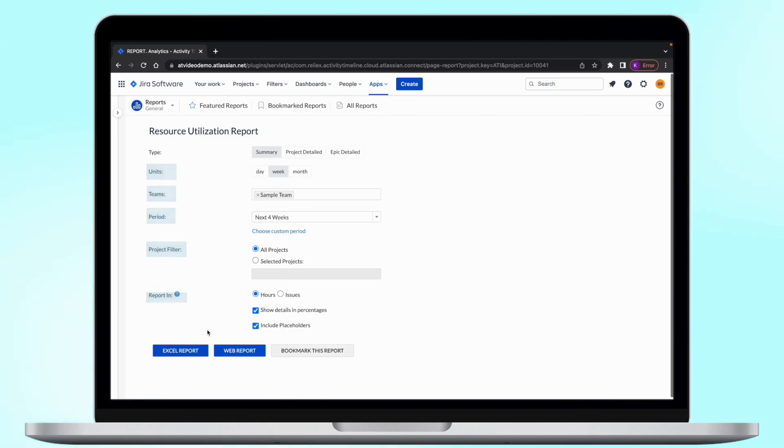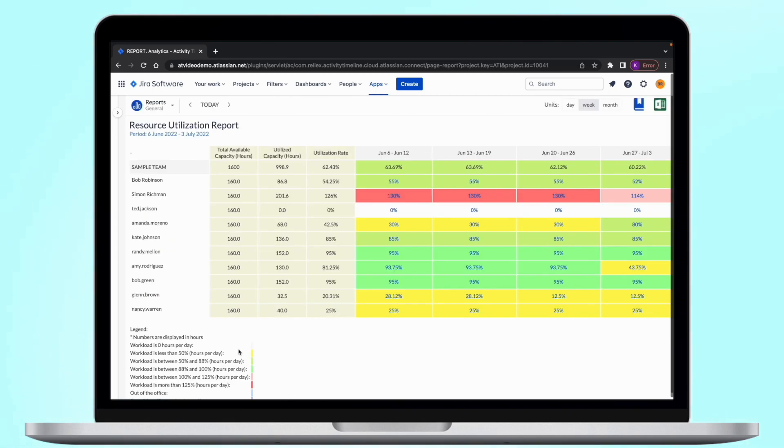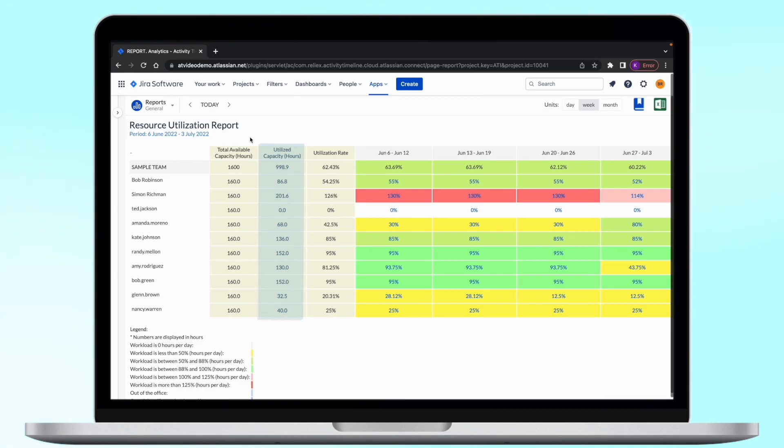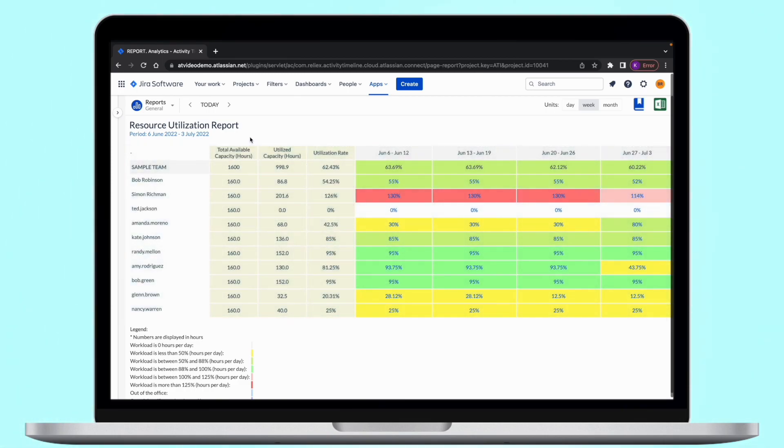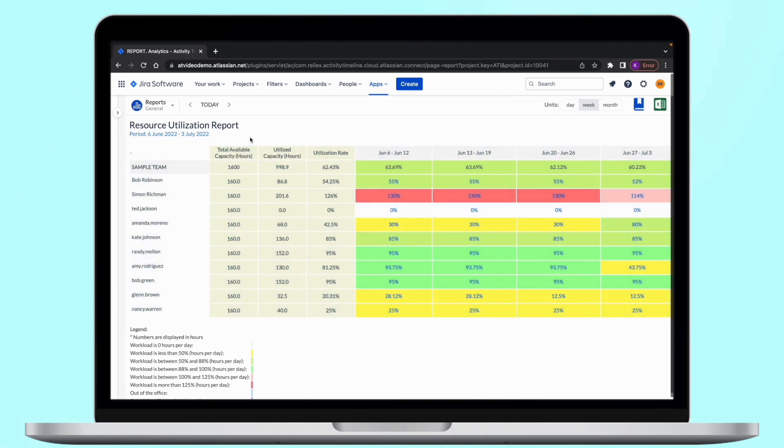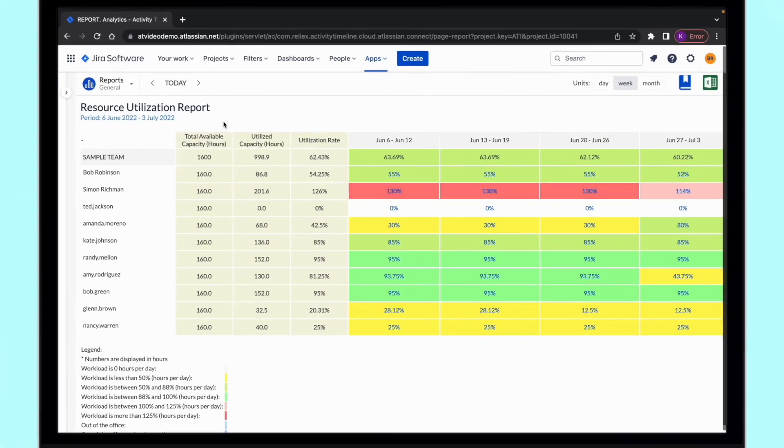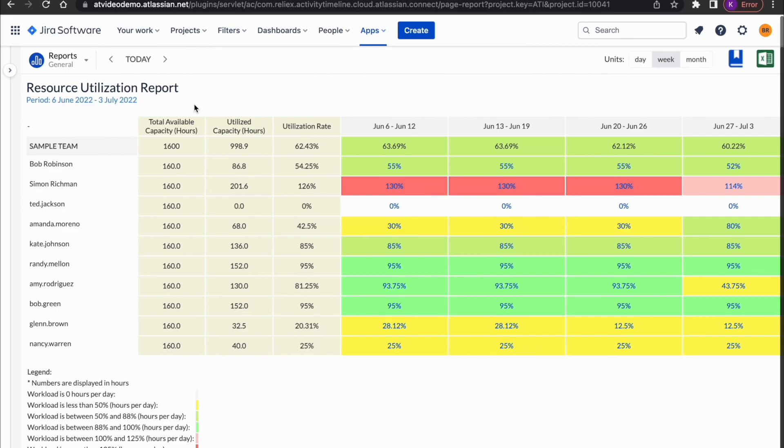A summary report shows users' workload across all their projects. Here you can see what is the total available capacity of the user and team in the period, how much of that capacity is currently being used, and what is the utilization rate. The data shown here is taken from the time estimates of tasks assigned to users on their timelines. The default option is to generate it in percentages but also available in hours, days, or even weeks.